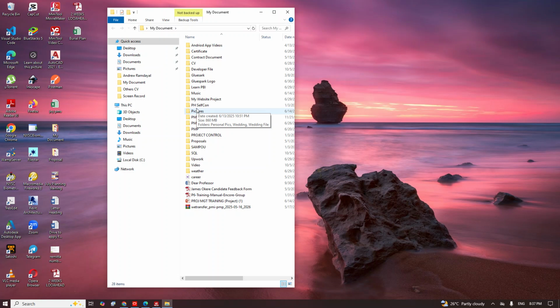So we pull out our data from P6 to Excel. That's the first step. So the second step is that in Excel, we need to remove some columns, which we call cleaning the data. We clean the data and rename the headings. That's the second step. Under the second step, we can also, okay, let's say third step, we can now add some formatting.